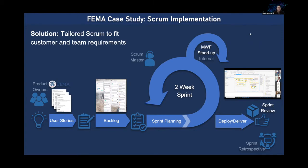Our sprints are two weeks long, and we have Monday, Wednesday, Friday standups internally. Our team meets for less than 15 minutes every Monday, Wednesday, and Friday. We give a quick update about what we're working on and any challenges or blockers we're facing. Any long conversation that starts to go on about a specific topic is an indicator that a separate meeting needs to be held to talk in more detail.